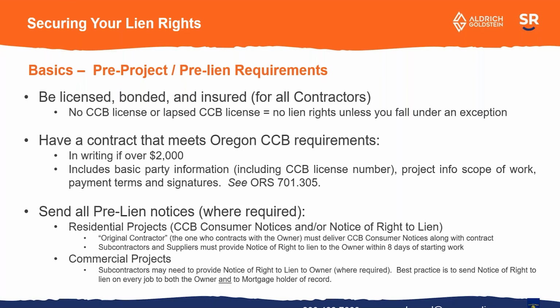And so we've seen a few cases recently where people come to us after they've already filed a lien, even though they weren't required to send a notice of right to lien early in the project. Because they didn't, the lender is saying, look, I don't really care about your lien because I'm first in line. So you want to preserve that priority, know what a notice of right to lien is. If you're a sub, I would just make it a habit of sending it on every project.